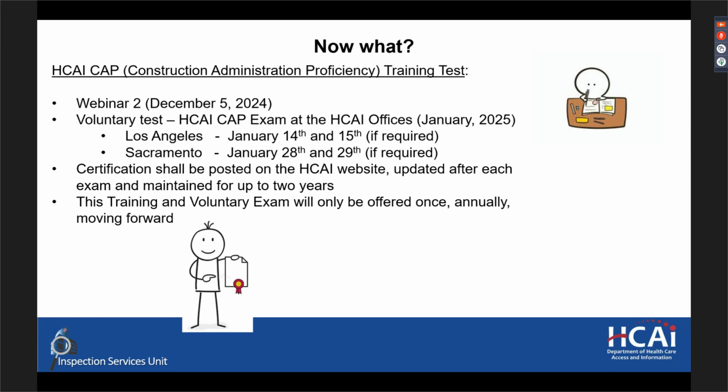The inspection reports, for me, would be the inspector's daily reports tied to that line item, versus the testing report would be something from the responsible party who isn't the inspector, who performed the test, that the IOR then reviewed and took no issue with. And also the DPOR reviewed and took no exceptions to, such as chlorination reports. Wonderful. Thank you, Darren.